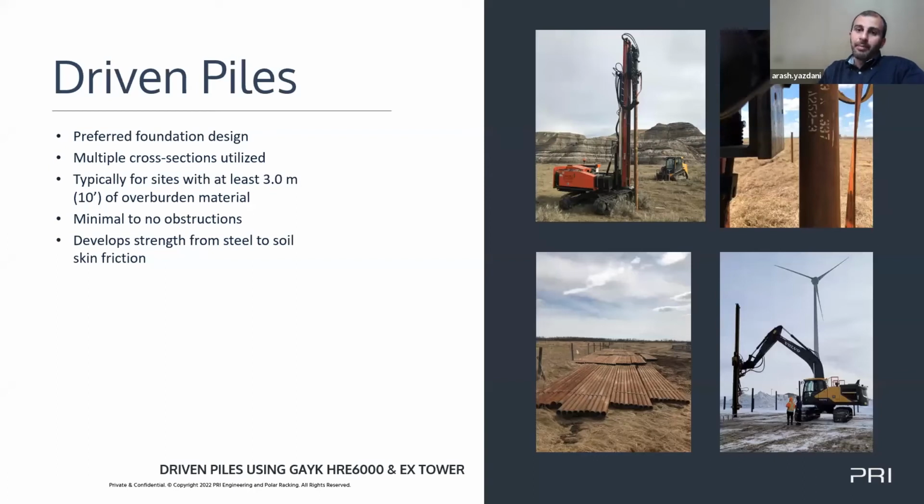If you can't match the subsurface conditions with your racking system, it may lead to some constructability challenges. Dan, it's like, hey, we have to make I-beams work on the site because that's all we can mount to, or we have to make a helical pile work, but there's a layer of sandstone or something. Exactly. So it's not always conducive to the ground conditions, and that's where cost escalations happen on the construction side.